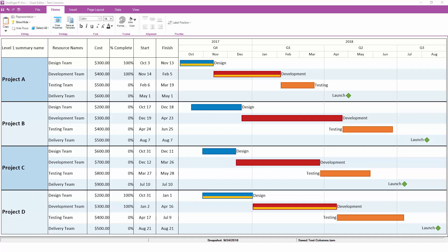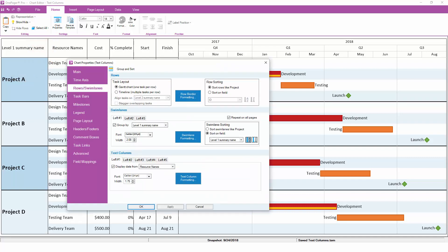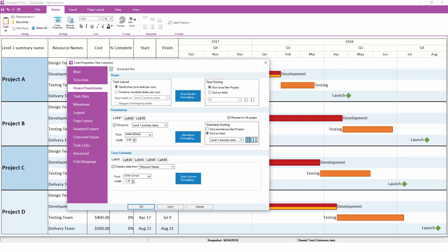To configure text columns, return to the Rows and Swimlanes tab. At the bottom, you will see five subtabs, one for each text column. On each of these tabs, you will have the option to first choose which field from your project schedule should be used, and then once that field has been selected, you will have additional text formatting options that are based on the data type of the field you're using. For example, the first text column is mapped to the Resource Names field, so there really isn't much formatting to be done.